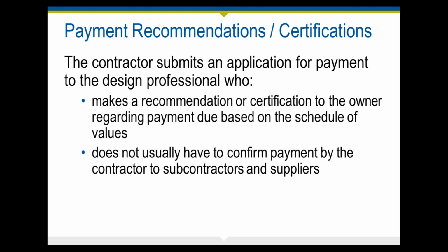Usually, it's not your job to confirm payment by the contractor to subcontractors and suppliers, right? Because that is on the contractor to do, and make sure that they're getting the appropriate lien releases and waivers from all of their subs as they're paying the suppliers.